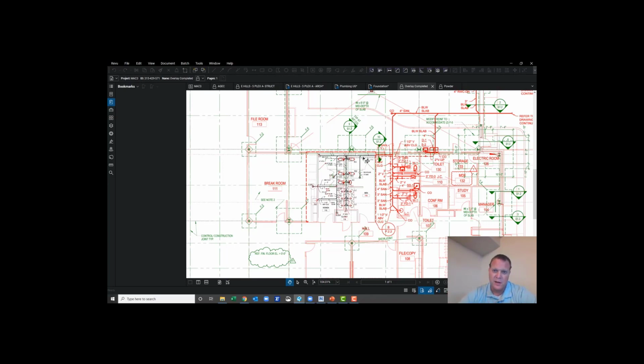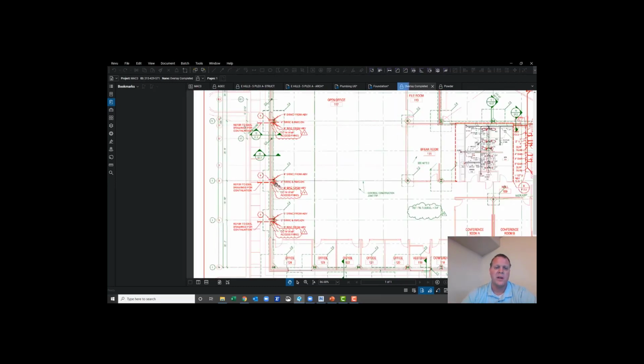So the general contractor, in my opinion, obviously regionally it's going to be different, and I'm going to try and explain those regional differences. Different parts of the country are more litigious than others, right? And if we get into a litigious area, you see some general contractors with this kind of thing be what I would call laissez-faire, hands off. The trades would have to come forward with this conflict, and then the general contractor would never do what I said. They would never say, oh, hey, I think we can just reroute this over there. They would immediately put it in the court of the designer and let the designer respond, and however much time that took would get documented, and they would follow the exact letter of the contract to request time for whatever delay it was.